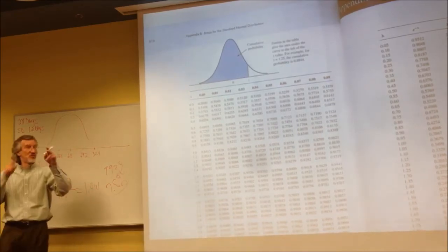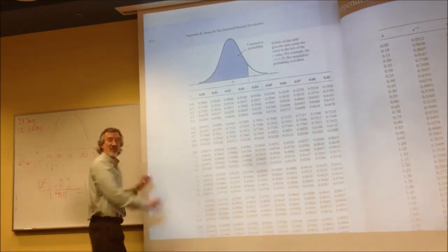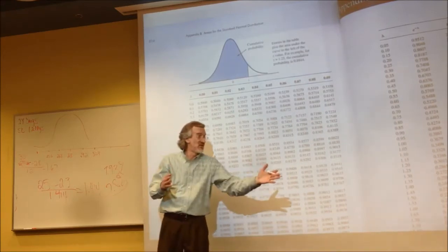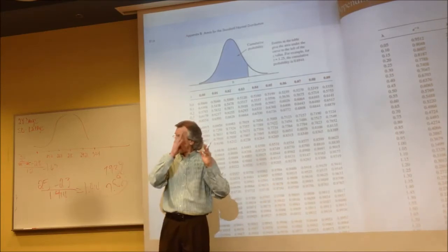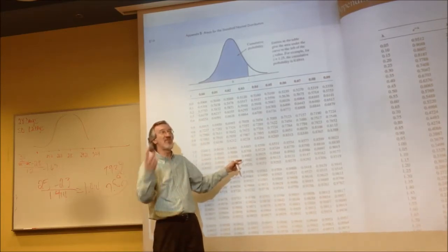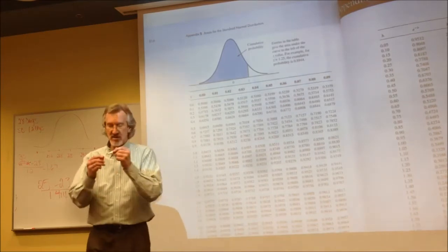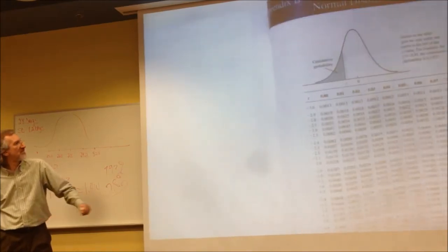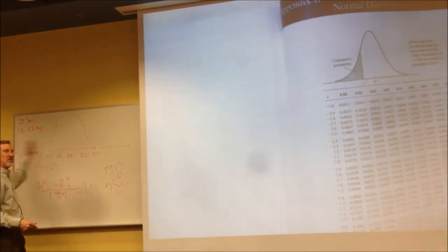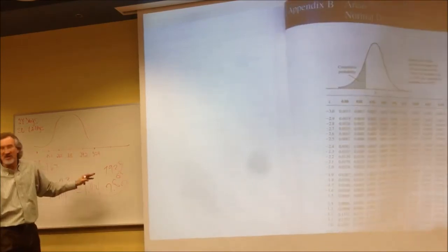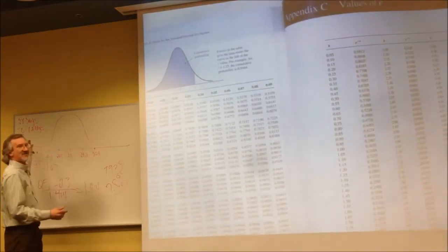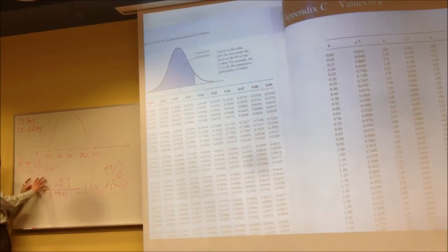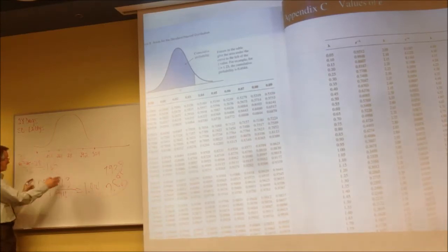But you got to watch the words. When I say more than, this always, don't forget, anytime you use either page of this chart, it's always giving the probability for less than. Always. For less than. And if the question's asking for more than, you look it up and find the opposite. Both pages. See how the shading's always to the left on this page too? This is giving you the probability of any number to the left of the middle. And then the other one's giving you the probability of any number to the right of the middle, but to the left. And so if it's asking more than, whichever, as long as you set this up correctly, whatever you're being asked about, minus what's expected.